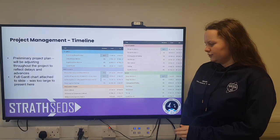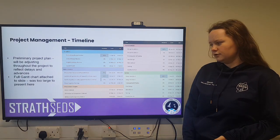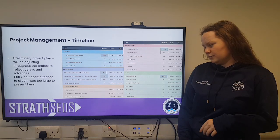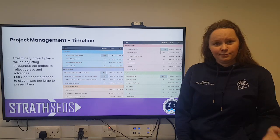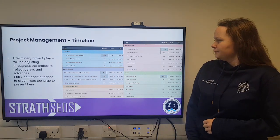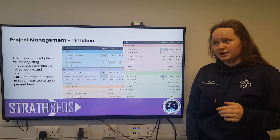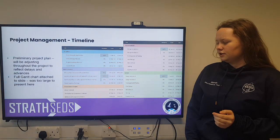In terms of procurement, the deadlines that we set ourselves is that we want our motor ordered by the 17th of February, all the rest of our mechanical components ordered by the CDR, and all of our electrical components ordered by the time you're hopefully watching this video, and we are on track for all of that right now. In terms of the launch vehicle and the CANSAT, we've completed the first iteration of both of the designs, so we're now working on the second design iteration.